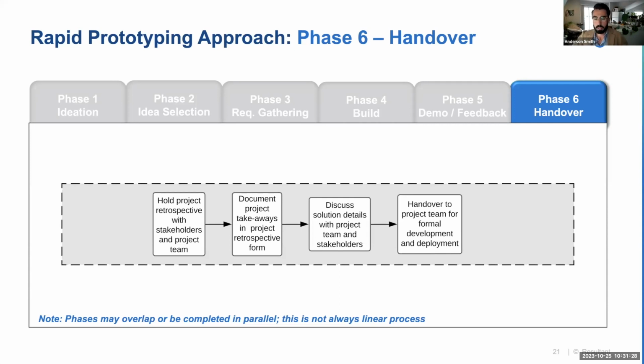But within your organization, that certainly could look a little bit different. It could be the same team doing the rapid prototyping and then doing that production solution build out. But if that's the case, it's just important to still draw a specific time bound for that rapid prototyping project, so you have a clear end of the prototyping where that prototyping phase is over, and then you can transition into a more formal solution build out under a more formal project.